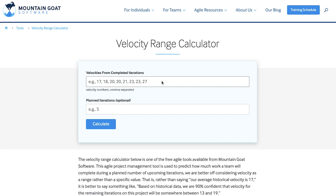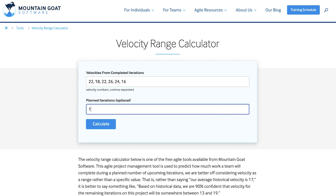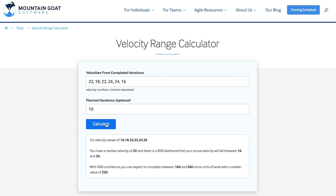If you would like a more advanced approach to calculating velocity, go check out Mike Cohn's velocity range calculator — I'll place a link to it in the description below. This calculator uses statistical analysis and will give you 90% confidence that your team's velocity will be in a certain range. It's a really cool tool, go check it out. But know that you'll need at least five sprints of data to use it.